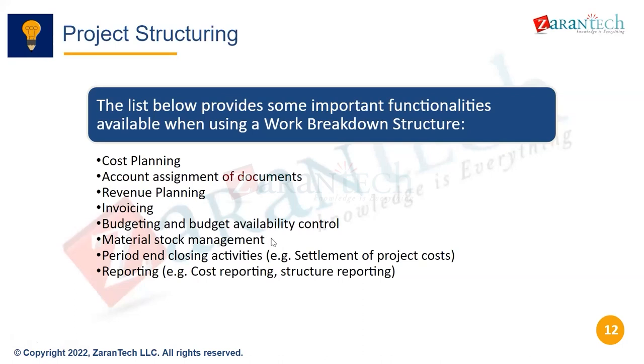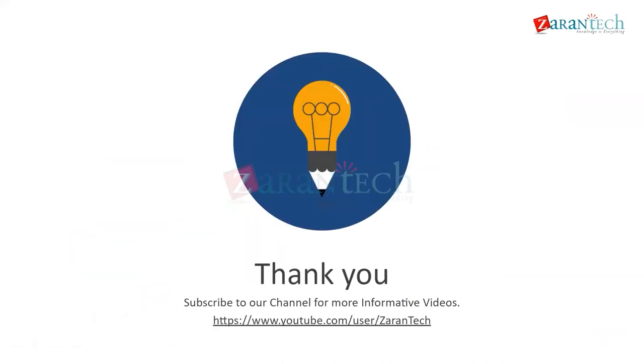systems. There is something called project stock. Just remember that. So that will make this happen, material stock management at WBS element. Then period and closing activities like settlement of the project cost to other receivers. Again, that is possible with WBS element. And you can do reporting, cost reporting, structure reporting at WBS element level. Now let me go to the WBS element part.